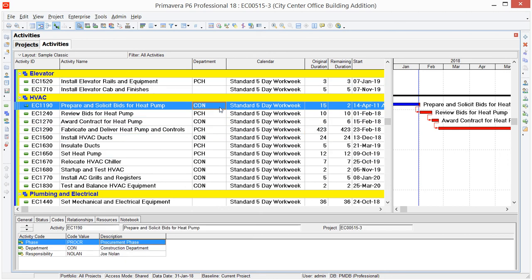So it's really great with activity code assignments. But another thing that Fill Down is great for is just changing standard P6 data. For example, you can see that I've brought in a column for Calendar into my schedule. Let's say that our project is slipping, and for this series of activities here in HVAC, we need to work on a 6-day workweek calendar in order to make up some time.